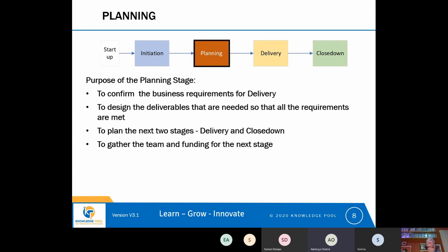So, I think the problem is addressed in two ways. The first is that, and we'll go on to talk in a separate session about risks, but during initiation, you would hope that the project would identify exactly the risk that you've identified, which is that we choose a CRM system at the planning stage when we haven't got all the requirements, and we find a requirement in delivery that CRM system can't meet.